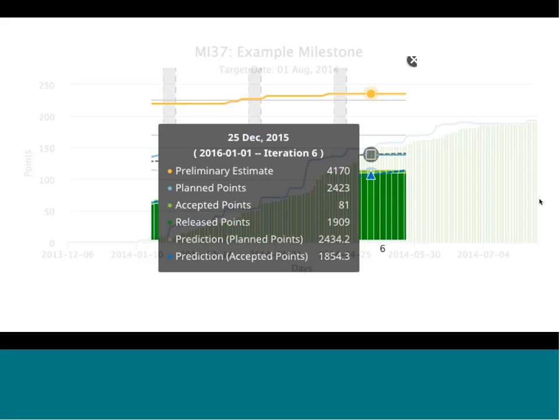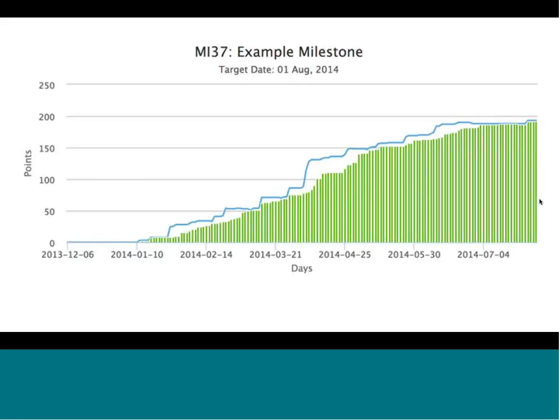So we also see a lot of people using milestones to burn up, and while it's not necessarily related to a release, oftentimes it can be related to a deployment or to something else of significance to the business. So, a trade show, or maybe we're trying to get a bunch of work put together in time for a beta release. So the milestone burn up just shows how work is tracking to a target date, right? And in this case, the target date is sometime in July, around 7/4, maybe a little beyond.